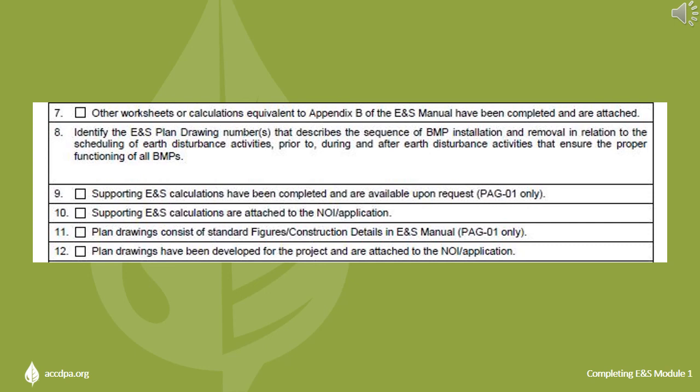Item 8 asks that you provide the ENS plan drawing number where the construction sequence can be found. Unlike PCSM Module 2 that asks for the entire sequence, the sequence itself should not be entered in the space — just the drawing sheet number or numbers where the sequence is located. Items 9 and 11 are for future PAG01 submissions only and should be left blank for a PAG02 submission.